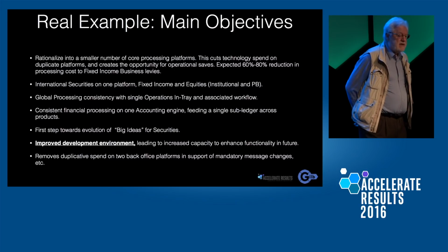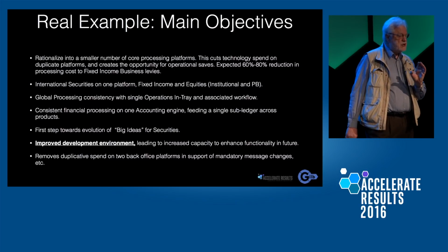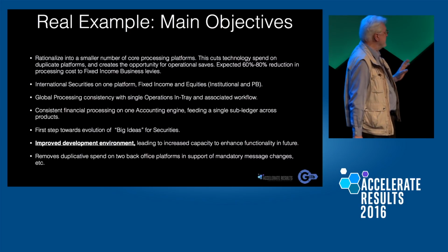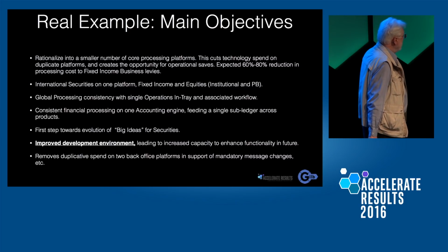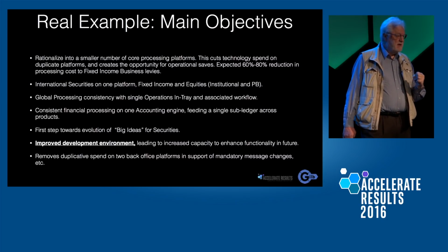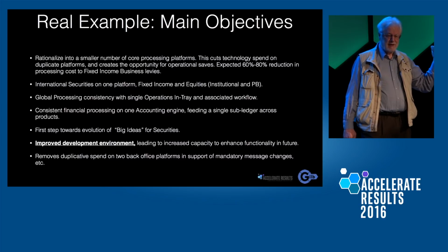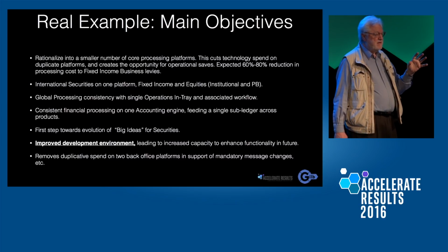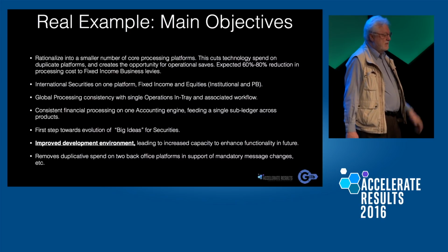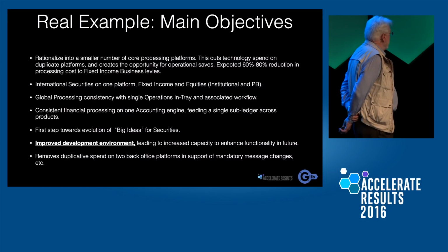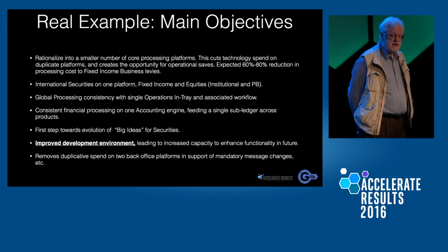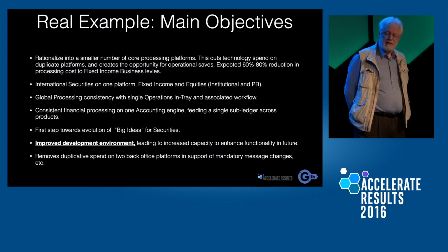We got the executives to do a little of what we call specification quality control. I'll get back to that later in the talk. It's a practice we have in some places here at Intel. Simply count the number of ambiguous and unclear words there. Maybe you'll find a few just by looking. A typical director found about 15 ambiguous, unclear words in just a few minutes. And they then said, well, okay, you've convinced us that we have sort of a garbage-in situation here, but what can we do about it? That's the way things are.